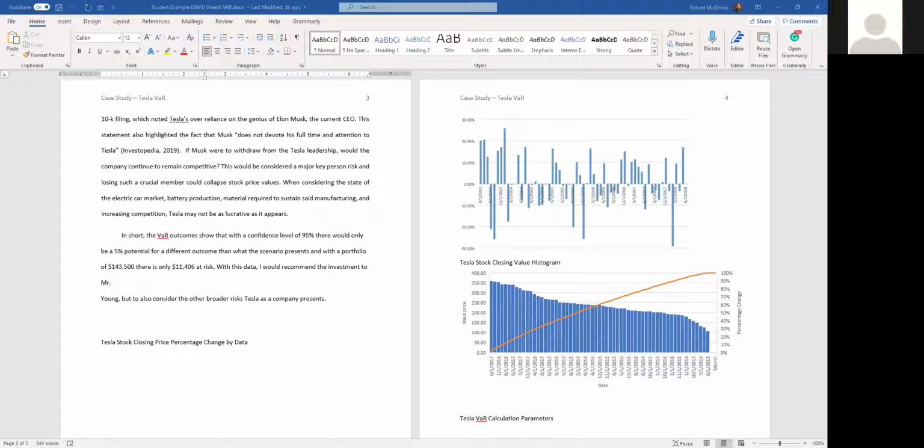So for each risk that we have, other than the risk map, do we need to put the severity of each risk as we're discussing it throughout? Yes, that would come after the profile. You wouldn't do the severity and the likelihood. There's actually two values, because in your risk map, you're going to have 4 quadrants. Unlikely, low impact. Very likely, low impact. Highly likely, high impact. And the last one would be highly likely, low impact. And that would be how the risk map would fall out of that.